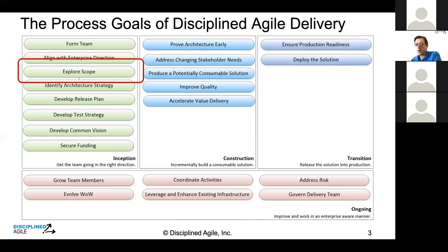Like maybe you've got a story that's already built, implemented, tested, but when people were building it, the developer said, "Oh, this is a mess, and it needs to be fixed one day." And particularly this module, I think that's about an 8. Rewriting it, refactoring it, getting rid of that technical debt is not going to add any visible value to the business. But long term, it will result in higher quality, easier to maintain. So there's a business case to be made for actually refactoring it. So that is separate from a story. It doesn't add specific visible business value, but it should be prioritized with other value-oriented work as well.